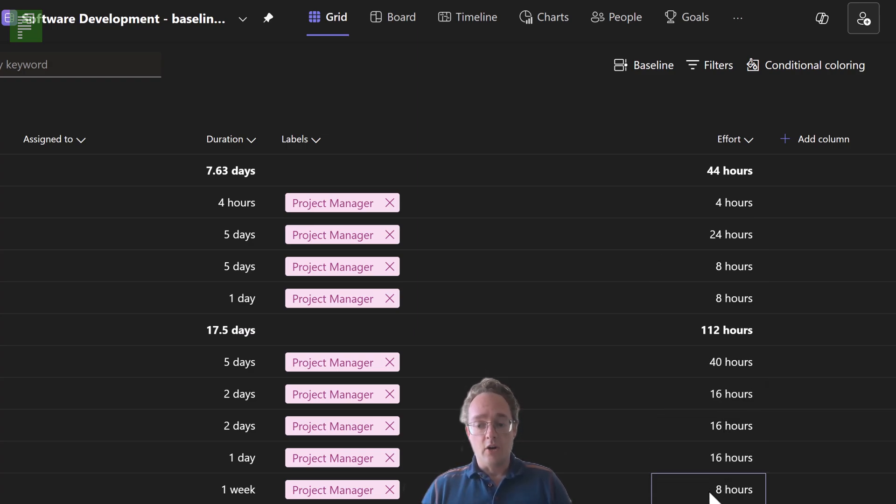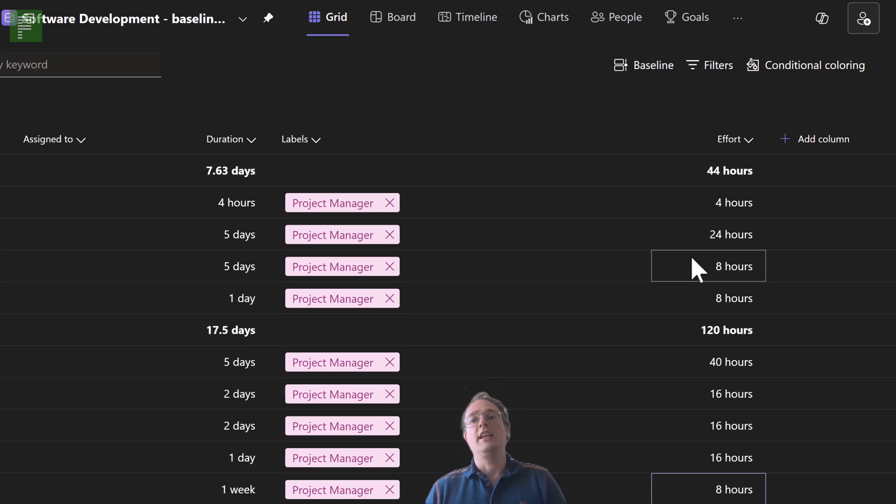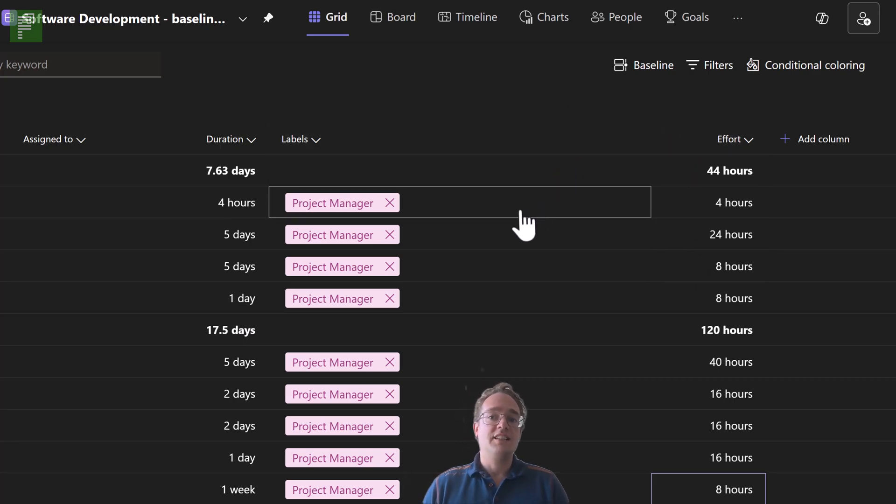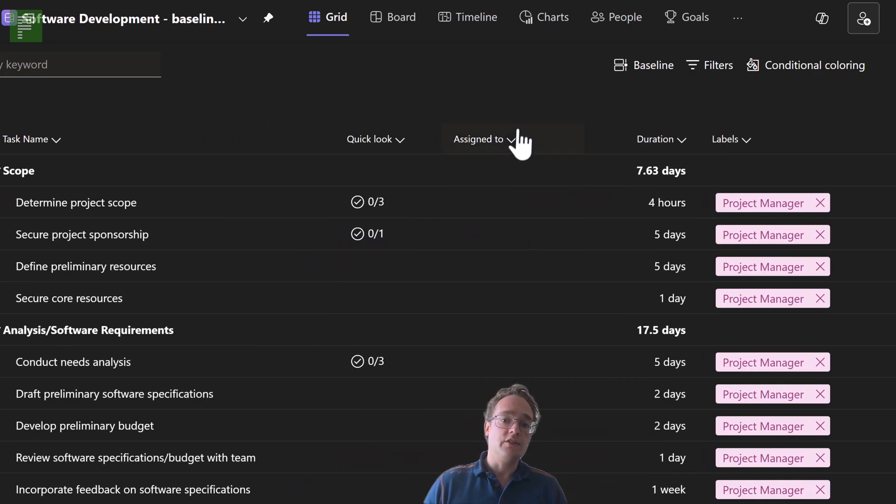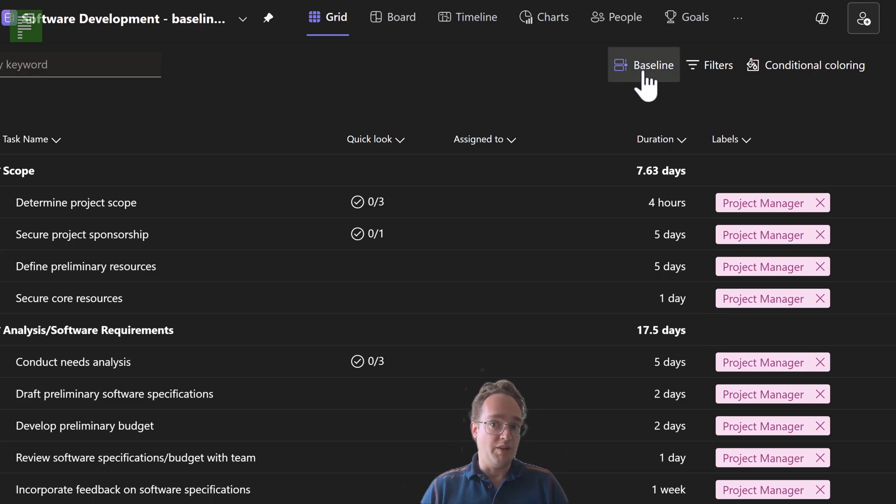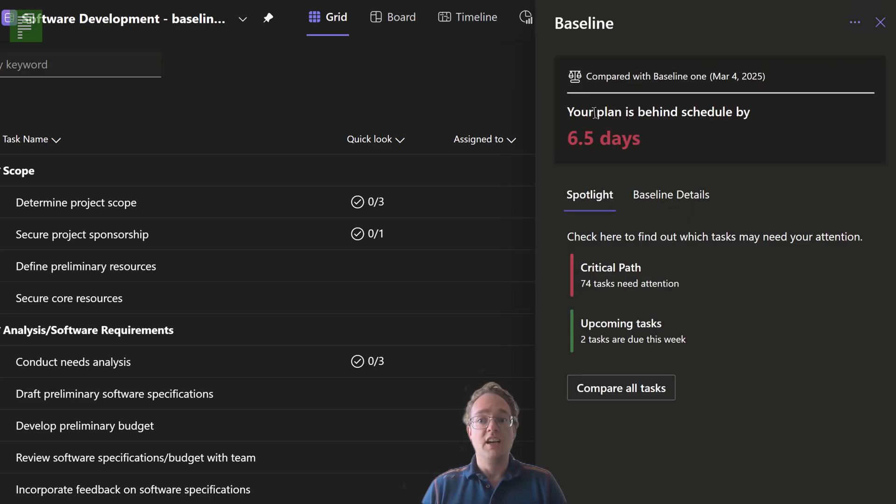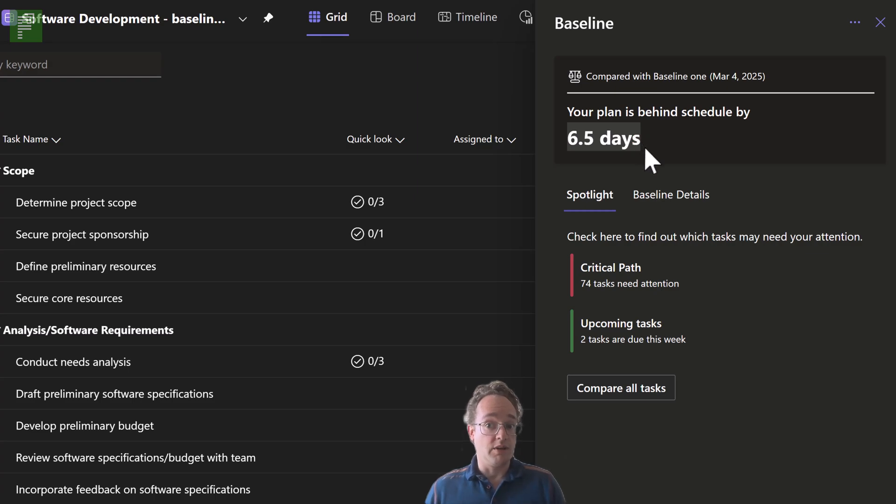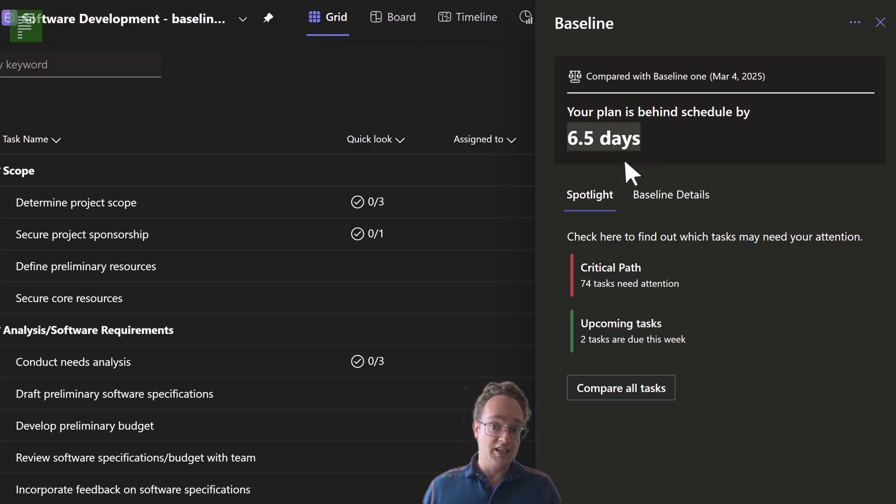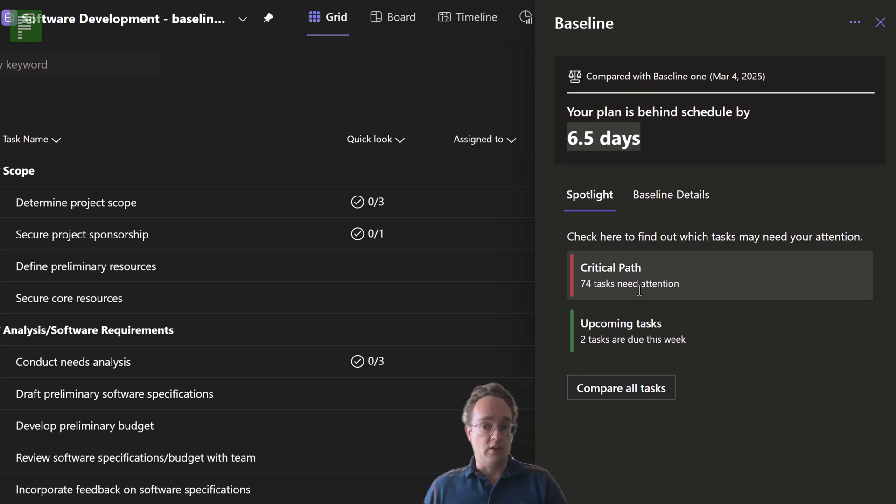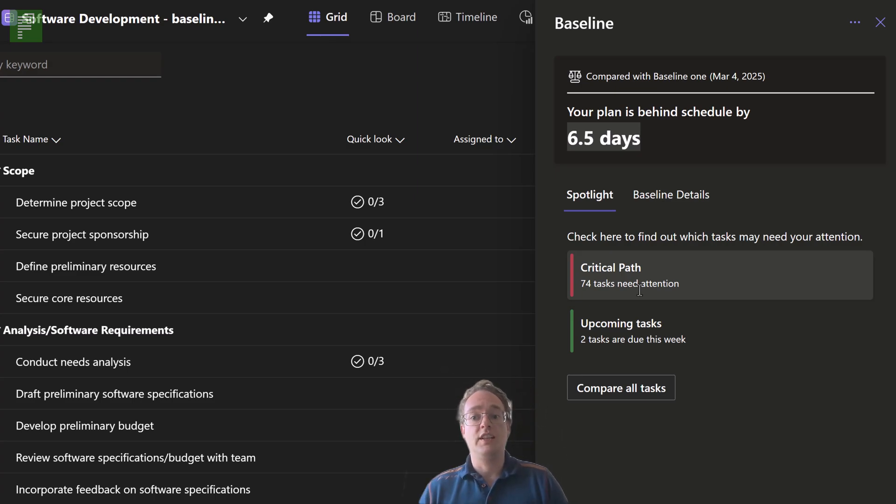All of these changes are being done in the live schedule, in the current schedule. So that means there is a difference between what is in the current schedule and in the baseline. We immediately see that we're behind schedule for six and a half days. And we now also see a critical path showing up in our spotlight. Very nice.